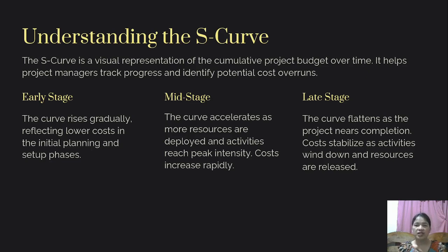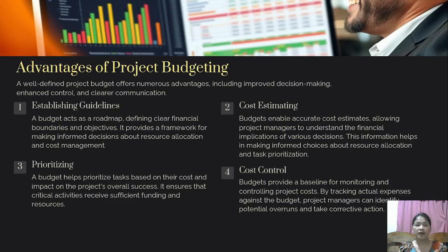The late stage, the curve flattens, as you can see on the curve that I have shown you earlier. So the curve flattens as the project nears completion. Cost stabilizes as activities wind down and resources are released. So why is project budgeting important? So these are the advantages of project budgeting.